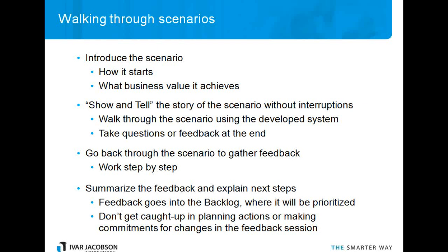So basically, try to get through the whole scenario without interruptions. And then if there are questions or feedback, walk through the scenario to gather the feedback step by step and have somebody recording the issues. And then, as you end the session, briefly summarize the feedback and explain the next steps. Talk about how this feedback goes into the backlog, where it will be prioritized.